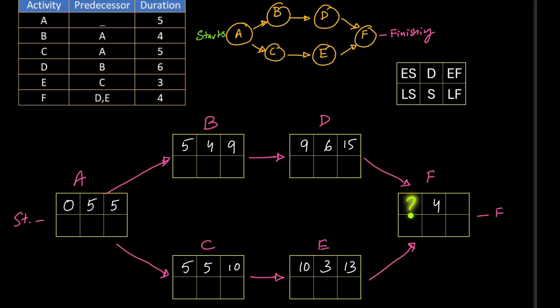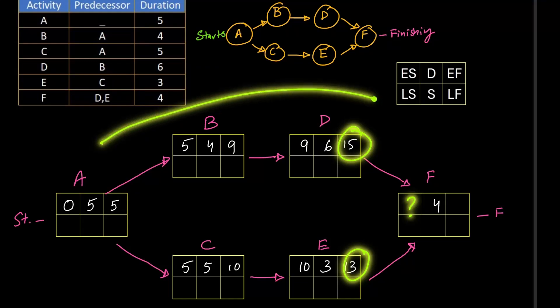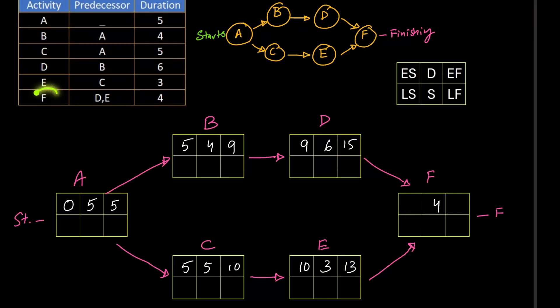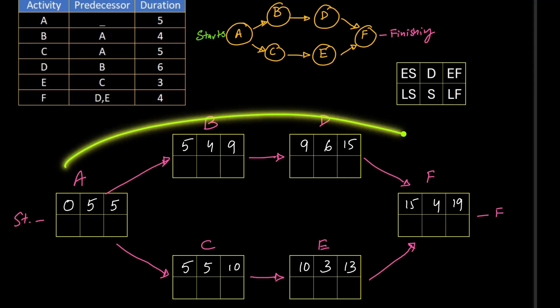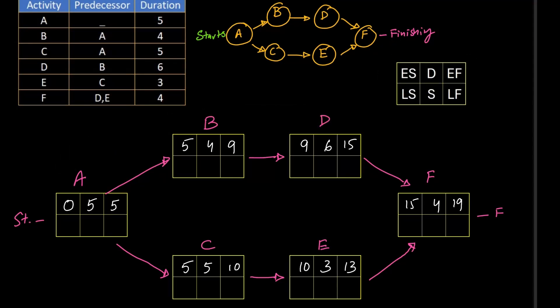This is the ES box, early start box of F. So what can be written, 13 or 15? Since we are in the forward pass of the project, we have to write 15, the highest number between the both, because F can only start after the completion of both. 15 plus 4 equals 19. Now forward pass is done with the upper values calculated. Now it's time to find out these three values one by one. And when the project finishes, EF equals to LF, means 19 will remain the same here.